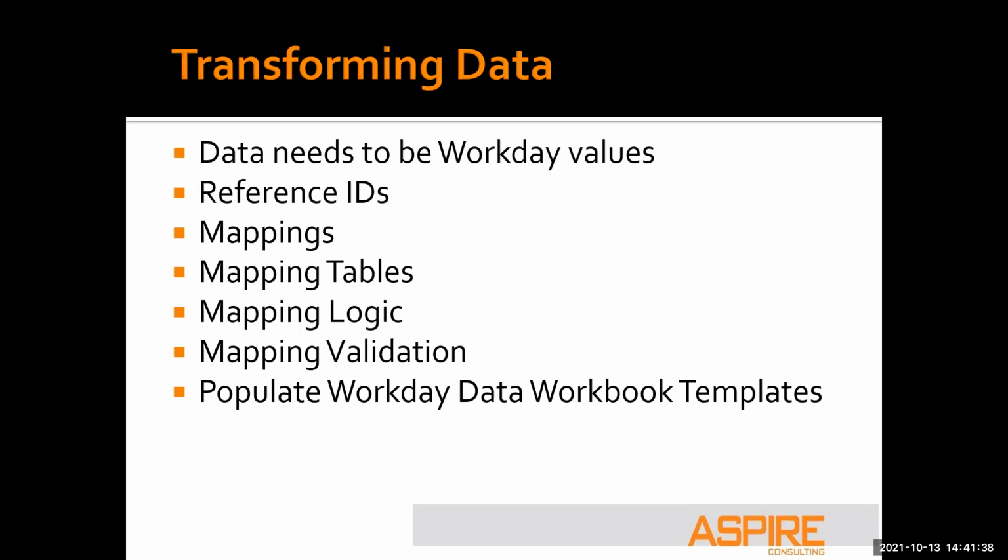So if you're going to provide your functional teams with the transform data, I always recommend that you also provide them with the PeopleSoft data pre-transformation so that they can see, okay, here's where I pulled this state code from PeopleSoft, and that state code is this in Workday, and they can see how that was transformed. But in the end, you're going to fill out a data workbook that will ultimately be handed to your implementation team to validate and load.